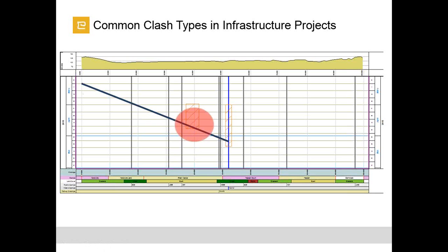Of course, this is the engineering decision, how we should solve this clash. TILOS cannot offer us any solution. It just informs us as an early warning system, and we need to now take a corrective action. So we can start again as we planned. So we can come to this point and we can wait around 1 week, and again we can proceed with our work.